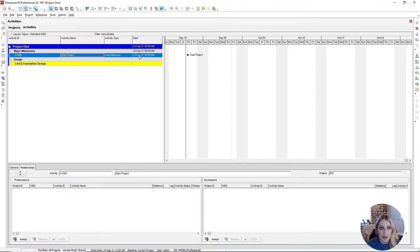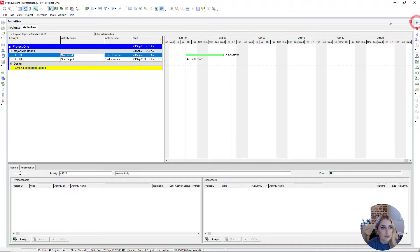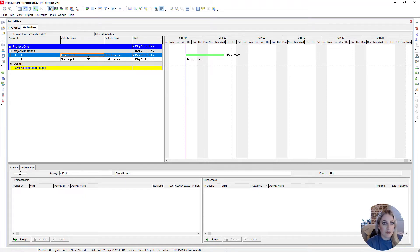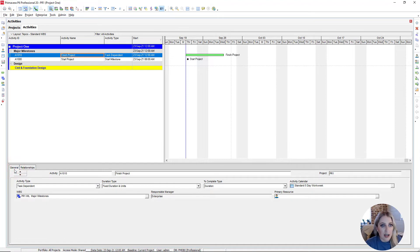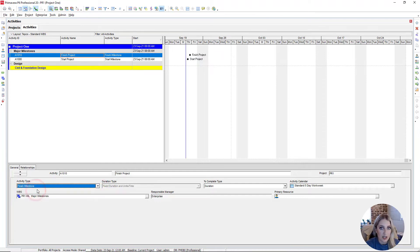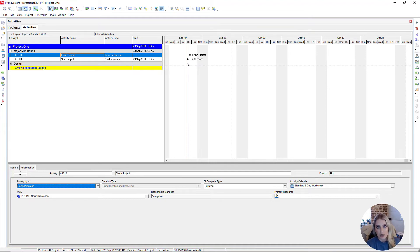We're going to add another activity by pressing the plus sign at the top right. This one is going to be 'Finish Project'. Notice it defaults to task dependent. To change that, I'll use the General tab at the bottom. Under General we see Activity Type — clicking the drop-down, we'll change this to finish milestone. We can see 'Finish Project' pop up in our Gantt chart. You can tie start milestones to the beginning of a set of activities and finish milestones to the end, so you can track progress based on those milestones.